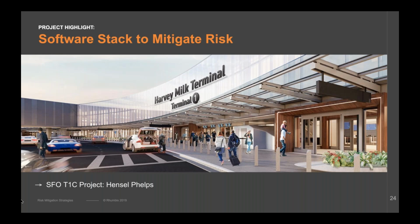Through HoloBuilder, our team was able to get the benefits of having time travel, where we can harvest these photospheres, log them, and organize them on our plan views. So if we ever have a changed condition, a dispute on schedule, or if the owner simply wants to understand what has already been built in order to better inform their stakeholders as to what decisions can still be made, they're able to jump in and easily navigate the software environment. What we've always called it is the single source of truth. It's no longer my documentation versus someone else's. It's a shared open pool of 360-degree imagery that's able to best reflect the condition of the project through different slices in time.